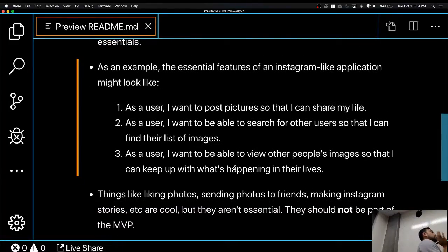Okay, let's take 5 or 10 minutes. See if you guys can come up with maybe 3 to 5 user stories or tasks. If you can, break it down by page. This is my project, this is my first page. What do I need to do on my first page? I need to make an input box. It doesn't matter, I want to accomplish this page. Maybe you guys are using Firebase. Firebase setup, make sure everybody has access to it. That could be one user story.